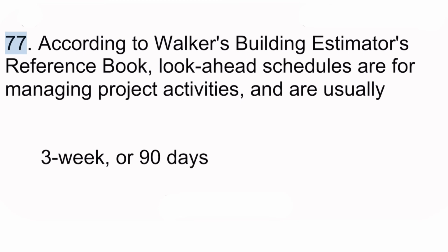Average. 77. According to Walker's Building Estimator's Reference Book, look-ahead schedules are for managing project activities, and are usually 3 weeks or 90 days.